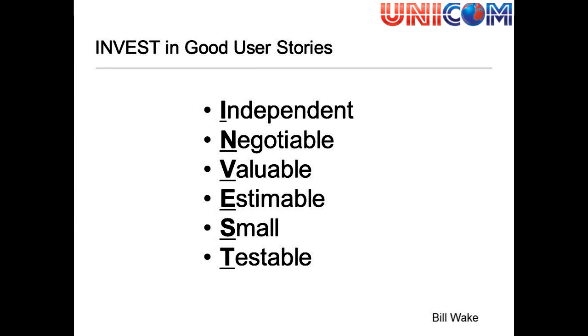So this is a key part for a tester when elaborating on a user story. When the Scrum team is estimating these user stories, we mustn't forget about the testing aspect. You'll come across scenarios where developers will put an estimate on a user story that's quite low, and they may have neglected to consider how difficult it might be to test. So testing must be considered and included as part of that estimate.